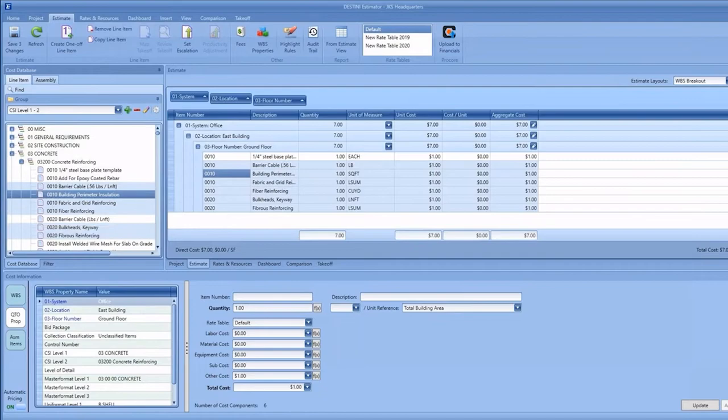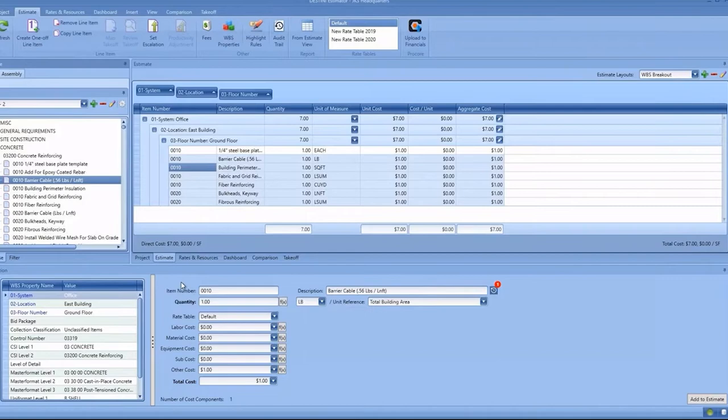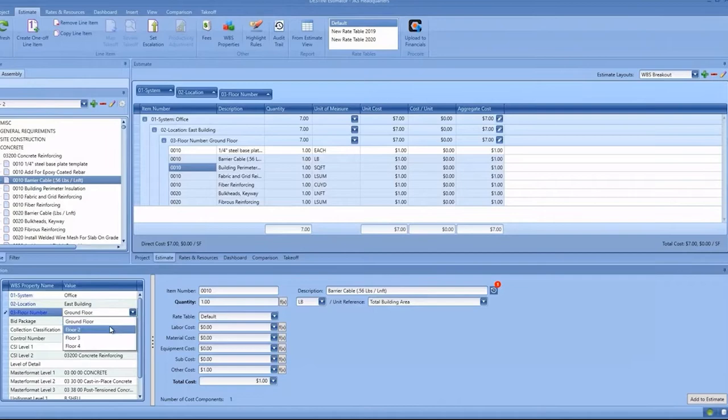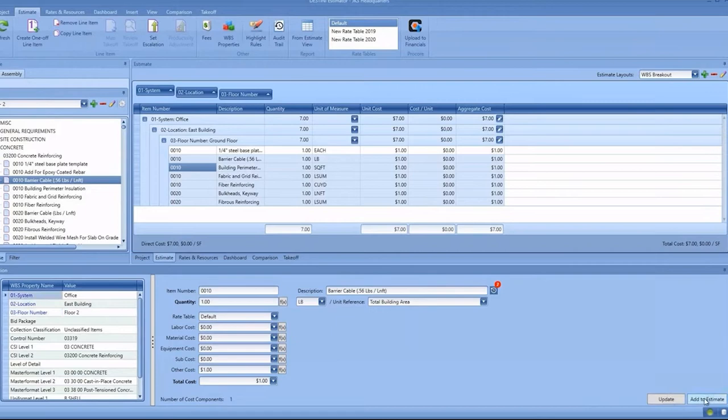This view enables you to select items directly in the estimate and see them here. From here, you have the ability to classify them. If you've got what we call sticky WBS properties or specific classifications to add—for example, instead of being on the ground floor, maybe you're working on the second floor—I can pick that and click Add to Estimate.